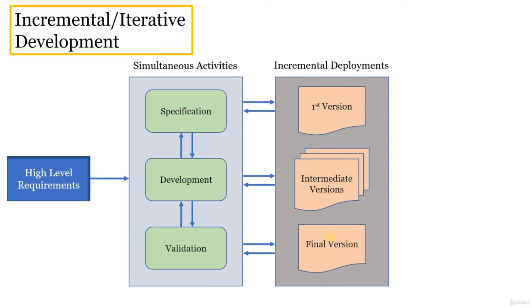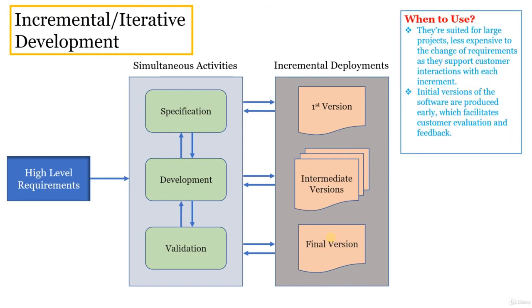Okay, so let's move on to the next one. Before we move, when can you really use this incremental or iterative development? They are suited for large projects, and are less expensive with respect to changes of requirements as they support customer interaction with each increment. Initial versions of the software are produced early, which facilitates customer evaluation and feedback.